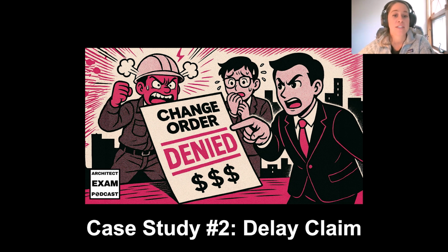So the documentation that helped resolve this situation included daily weather logs and photos of the site conditions, correspondence with suppliers showing that we were trying to get the steel there on time, on site, and there were just unpreventable issues. There were updated critical path schedules that were shared as well that showed the impact. So the contractor did a great job of constantly informing the owner of the project what was happening. And there was also tracking of mitigation efforts, of cost, detailed productivity analysis, and alternative sequencing proposals submitted early and shared with the owner so that they could really wrap their head around how delayed this project would be.